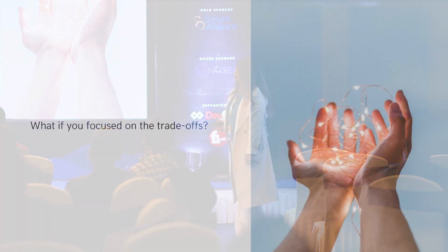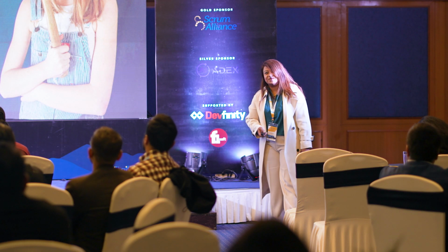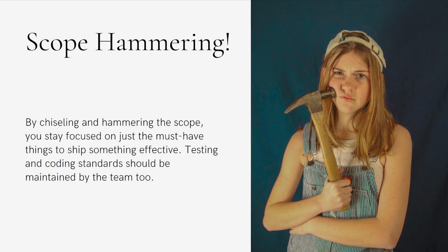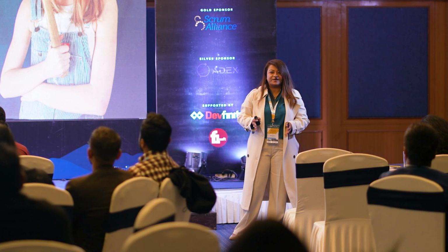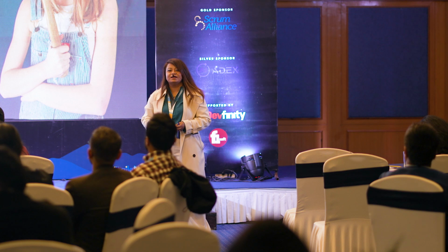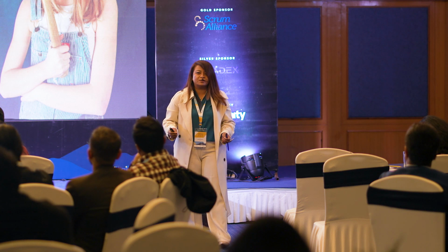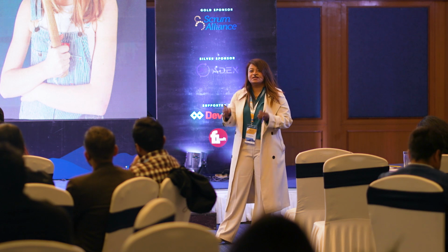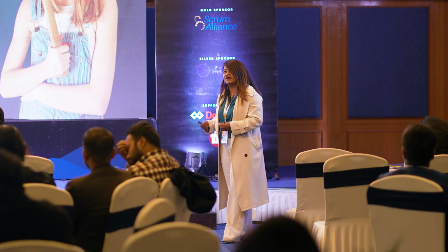So what if you focused on the trade-offs? Scope hammering. Sounds like a crazy word? Basically what this means is, previously we had defined that there is going to be a time frame and you're going to know how much work you can do in that time frame. So you keep that in mind and consider that if things don't roll out during that time frame, it's not going to go out at all. Sounds a bit harsh, but that gives that risk factor to the team. Then the team would focus on the must-haves, what needs to be done, what is more important. That focus will always be there.